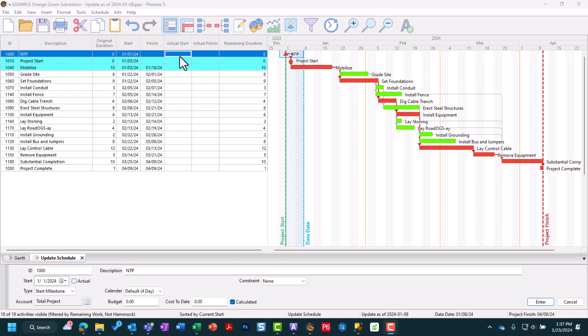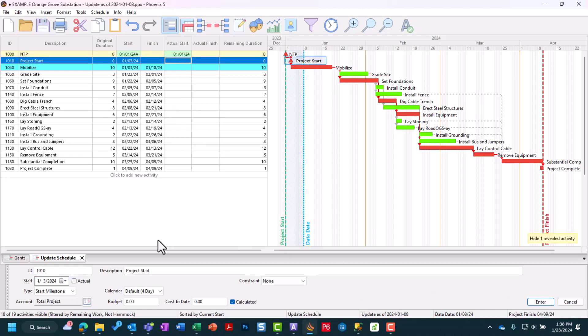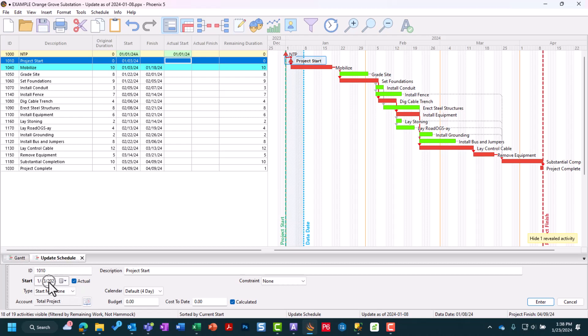According to the work that's actually been done in the field, Notice to Proceed did actually start. It's important you check Actual before you change your date. It started on January 1st, 2024. We can hit enter, and that locks it in. We can progress down to Project Start. From the field, we got an actual value of January 3rd. It started on time as well.